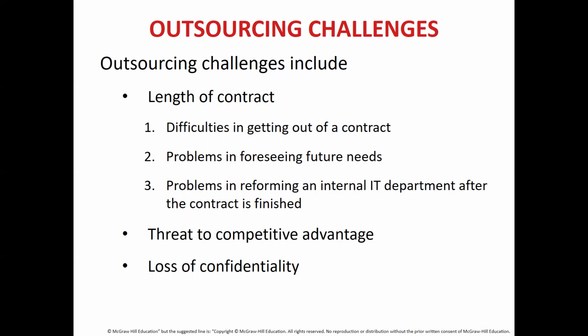Now, this can also be termed as the word contract. What happens is, if you put yourself in a contract and somewhere midway you want to get out of that SLA, you might need to pay a certain amount of money to get out of that project. And fair enough, rightly so. If you are pulling out of a project, the outsourcing company would be going to a loss because they have invested some time on this. So therefore you'll be bound to pay it.